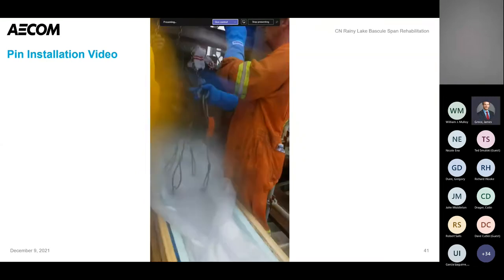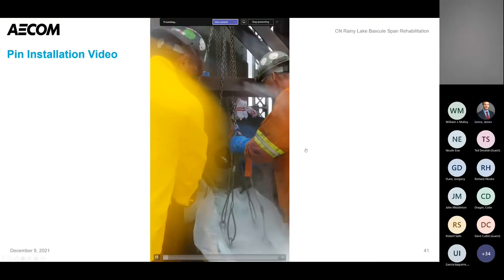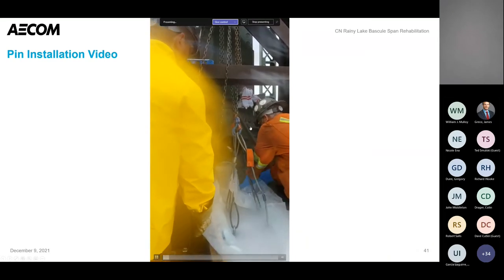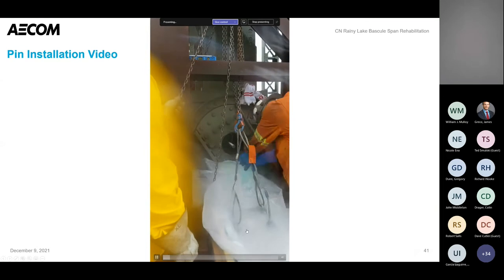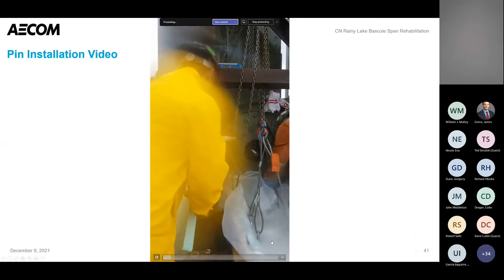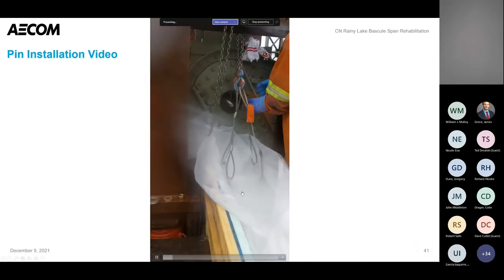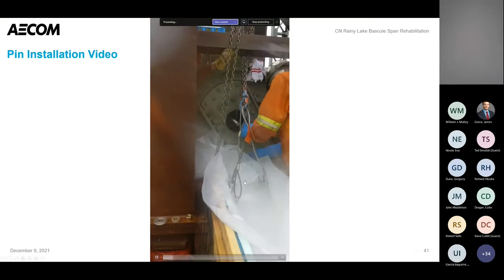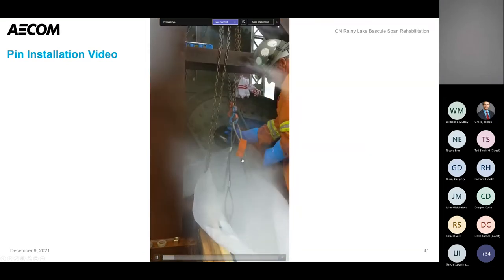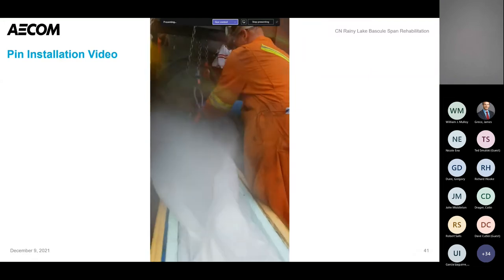True to its name — Rainy Lake — it was raining on the day they were trying to do this. The pins are in a bath of alcohol and dry ice, cooled down very cold to reduce the diameter. Once they lift the pin out of the bath, the clock starts ticking and they have a limited time, so it gets a little bit intense. There's already a rod sticking through — they have a hydraulic jack on the opposite side. Once it's lifted into place, they slip that rod through, get a nut on the other side, and physically pull it through to ensure it seats well.